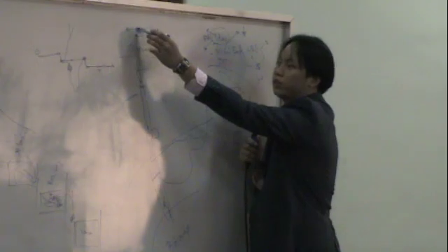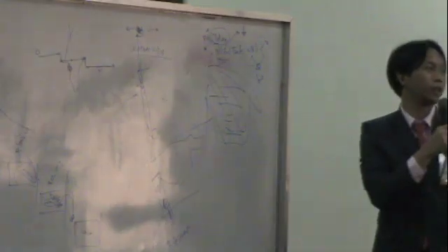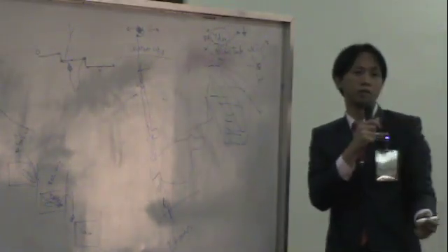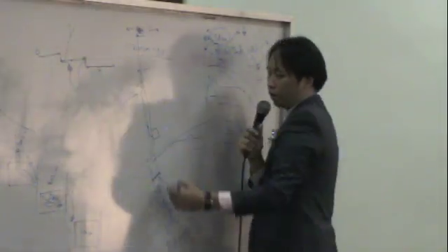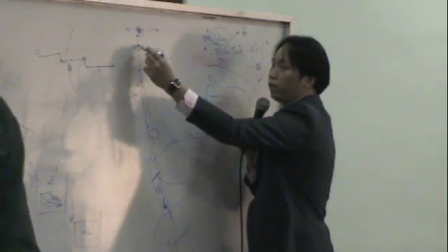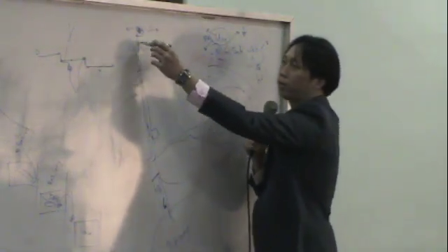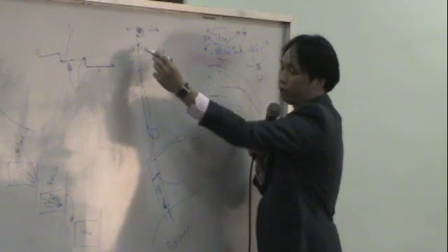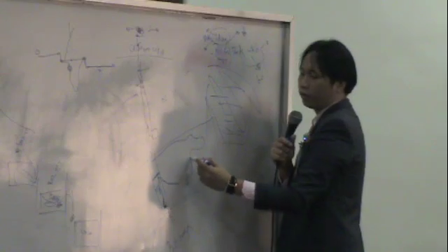We might not be able to reach this because this is gonna slow us down. Instead of projected 80 kilometers per hour, we're just going 60 kilometers per hour. So early at this point, we could assume that we might only be able to reach this point. So you coordinate with the person here. That's fine. I'll meet you there. Okay, and then you go here. You go around.